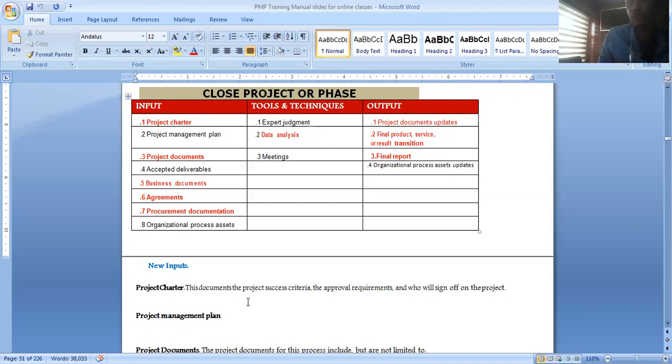You don't want to have an open contract somewhere when you're going to close out the project with the client. You don't want to do that. So ensure that you move from phase to phase, and you're closing the procurement contract you have with this man. If there's a place where you have to pay him or whatever that is required somewhere, you have it written down. Okay, ensure that whatever you have with him, you are closing it out, so that it cannot be transferred to the client when you hand the project over to the client. You want to ensure that you close everything in the project.